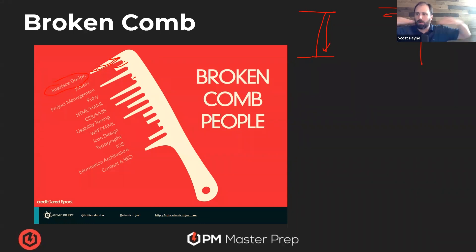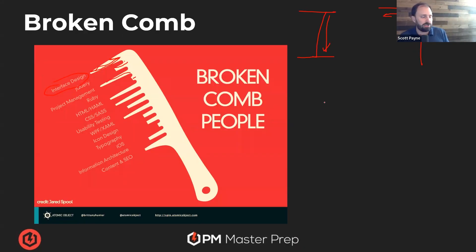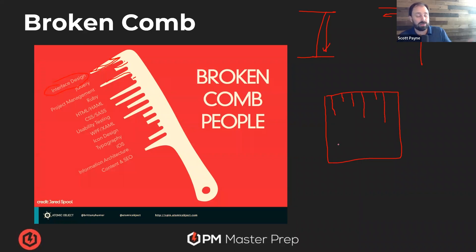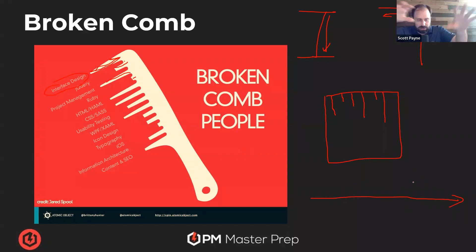We are not a monolith where all experience goes like a thin wideness — like a personal pan pizza. Like, I'm good at this, I'm bad at that. So each person has their own little comb forming — a potentially growing comb — or they might call it a paint can or paint drip. If you think of the end of a paint can after you use it, there are little drippy drips that go down. All they're doing is saying: where are you in these skills? So the team can look at themselves and say, 'I'm good at this and that,' and then look at what work's coming down the road — do we have the right mix of folks, who do we need to partner together, to use this strategically to build our skills and attack the work? Or do we need to bring in new people?